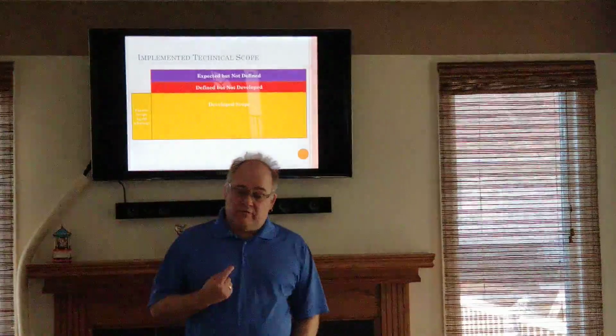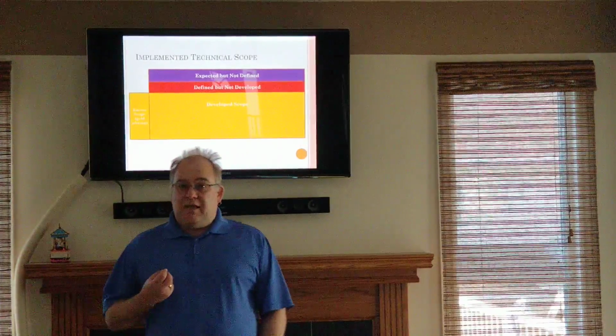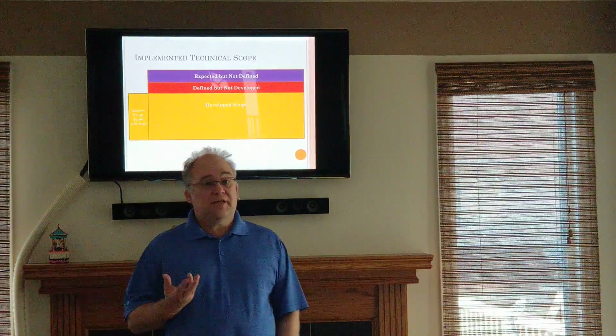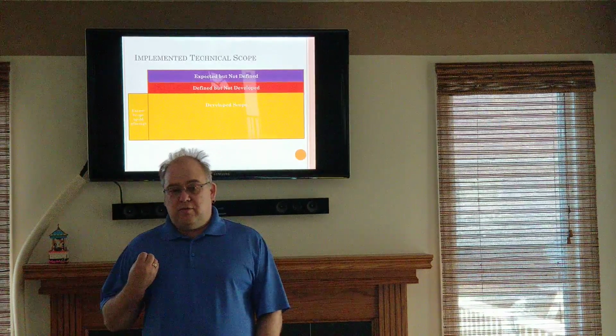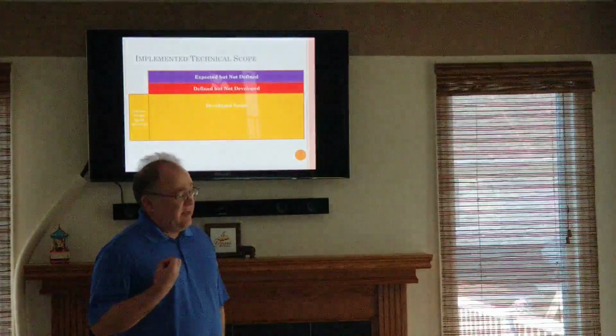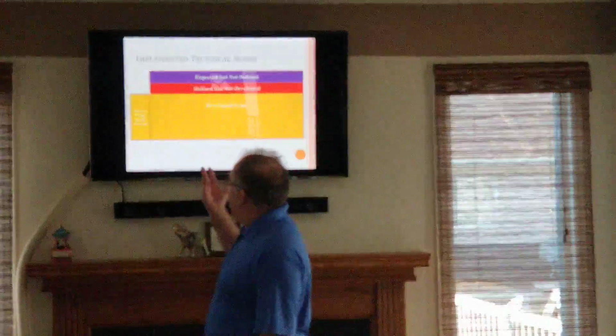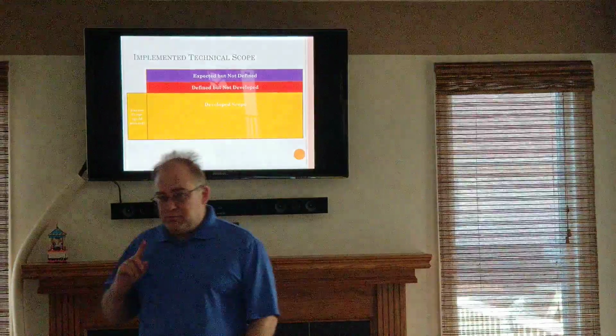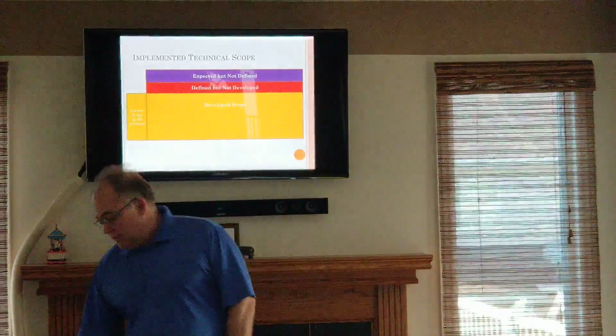In addition, however, sometimes development teams will actually go above and beyond. This is typically a well-intentioned exercise, but they will define some capabilities that are in fact outside of the scope that has been defined in the contract. This becomes problematic, as we'll see a little bit later on here.